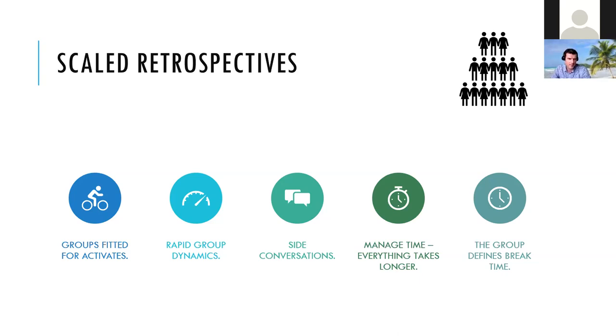Okay. One more question from Alexander. How much time do you need to prepare? So I would go with the worst case scenario, when I'm an external facilitator for a retro. In this case, I would say 2 hours. That's a bare minimum because you need to discuss with the main stakeholders: is it just a normal retro, or is it dedicated to such a situation?